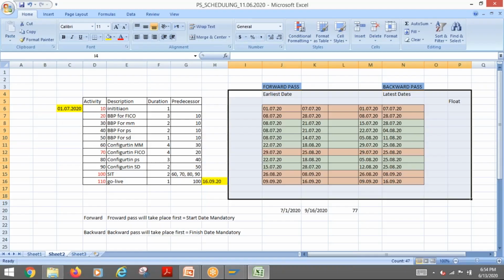Okay. So what I'm telling you is, for example, if you have a project with a deadline, then you need to consider backward scheduling because the deadline is fixed, right? You have a go live date. For example, you have some kind of a fair or inauguration.